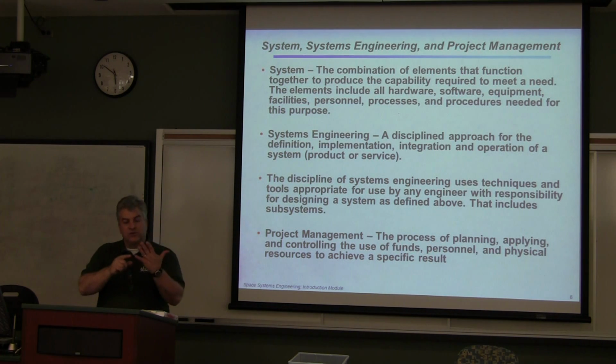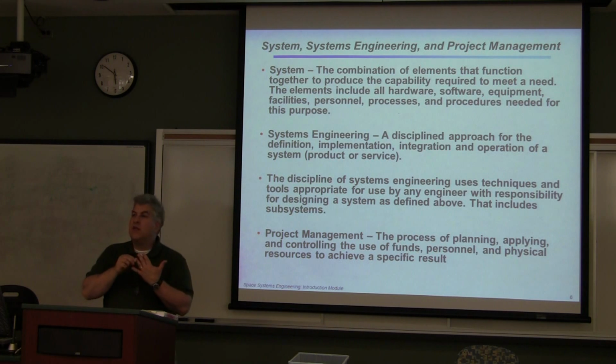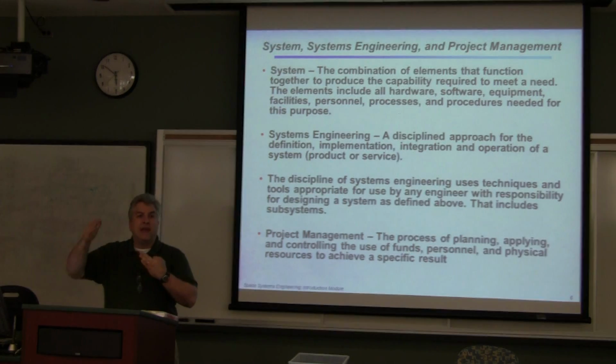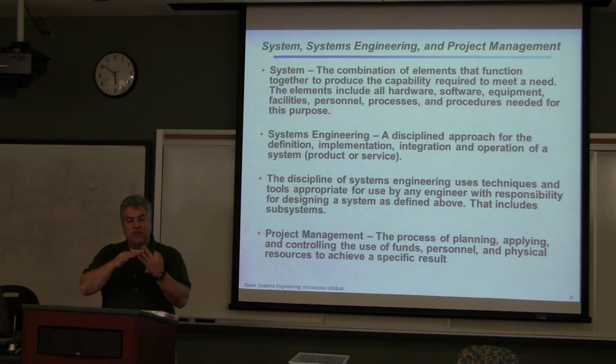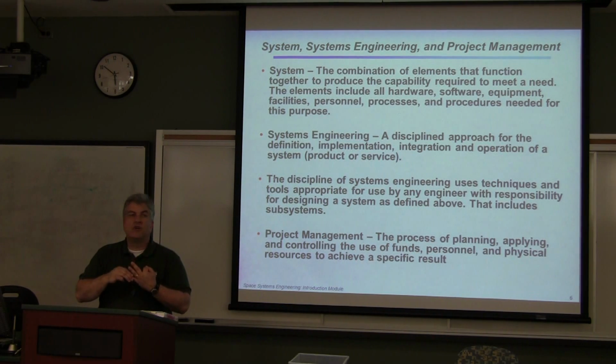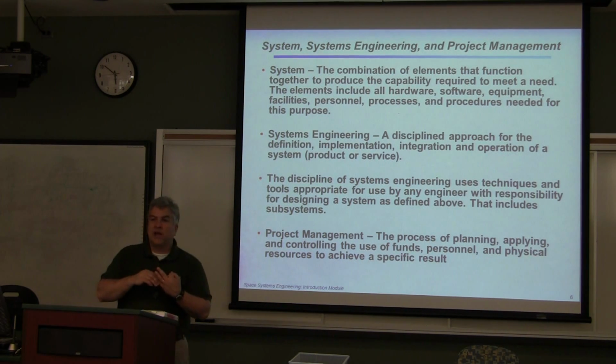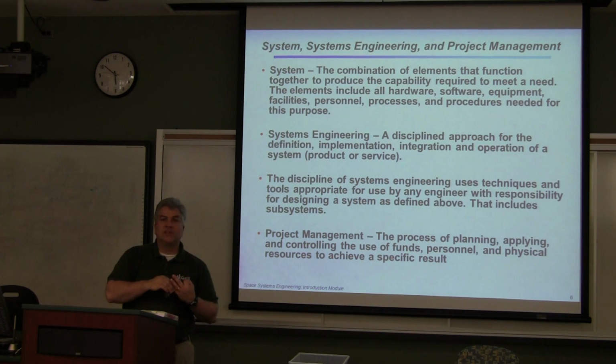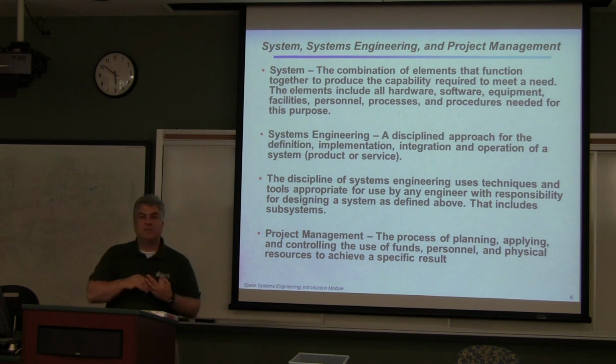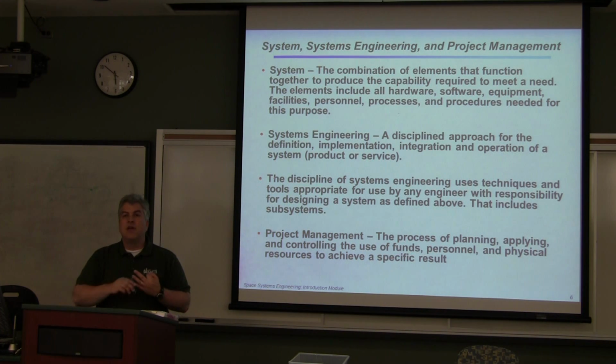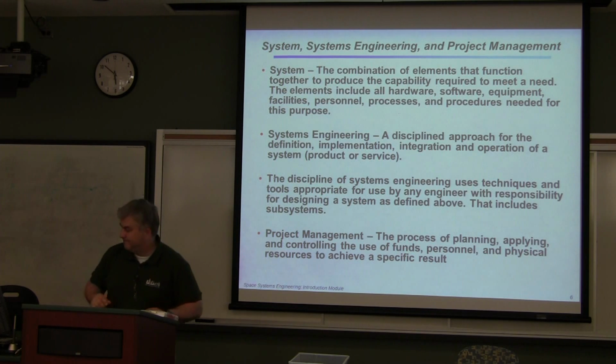He had concerns with the software programming, the electrical aspects, the mechanical aspects of the phone. And as project manager, I made sure that he had all the materials to be able to build prototypes, that we had building facilities or manufacturing plants to be able to do the prototypes and the final production. And I also was the one who coordinated documentation and final delivery to our customer of these phones.